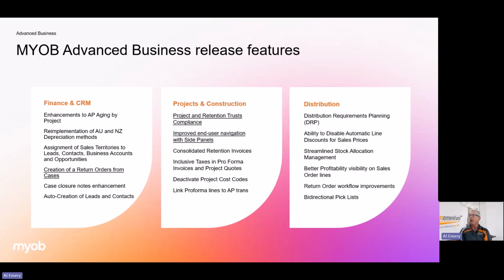So for any of our customers that are in construction and have projects that are subject to that requirement, needing to have a project and retention trust because of size of project and who the end customer is, being state government, health organisation, etc., MYOB Advanced is compliant with that legislation.